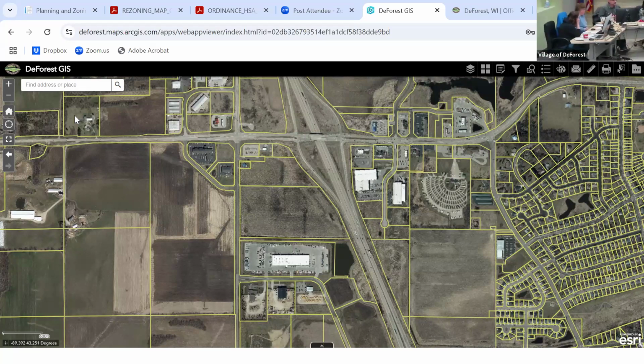Two quick follow-ups, Lisa. The village board recently approved the site plan amendments that you recommended, that whenever we get a site plan or a conditional use permit where there's some suggestion of use of hazardous chemicals or materials in larger quantities, there's now an ordinance requirement that there'll be a spill prevention and mitigation plan required as part of that submittal.